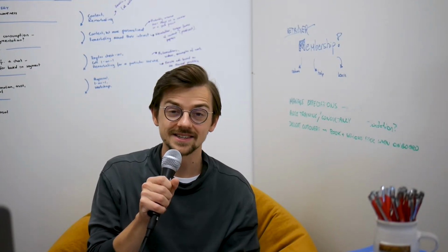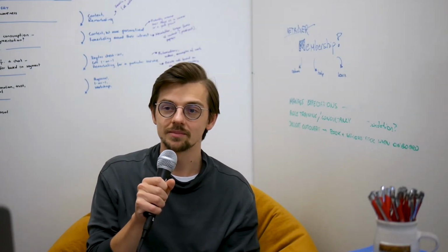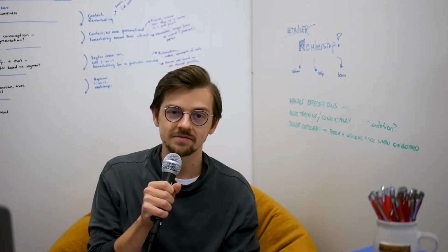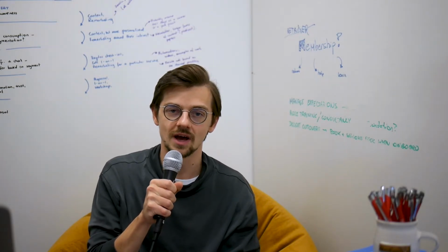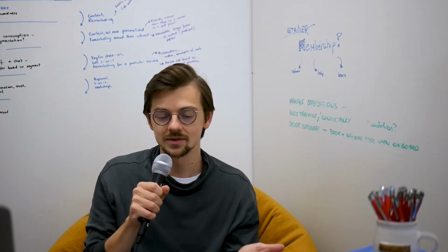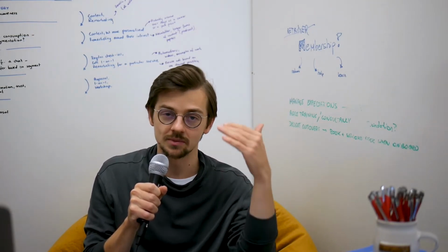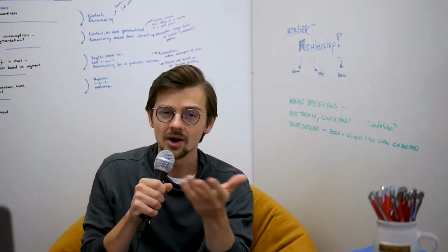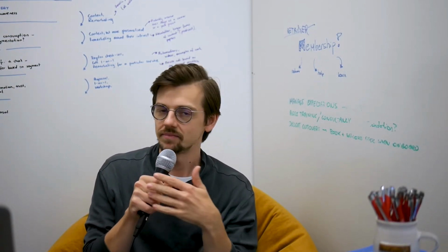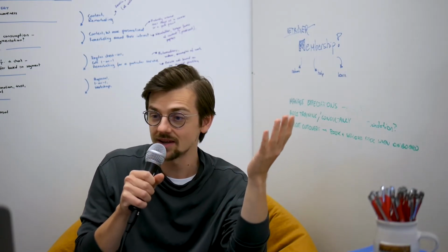Lastly, it's flexible. The entire approach is flexible. So you can wake up in the morning and be like, oh my God, that's a great idea. You come to me, you say the idea, we define the value for the end user, we write down the definition of done, what it actually looks like, and then we schedule it, we prioritize it. We know what we have in the queue, what the team is currently working on, how it fits into the picture, is it more important than A, is it more important than B, or maybe it has the lowest priority, but it's good to have it there, to not forget about it. Simple as that. It's flexible, adaptable, just like your business, and just the way it should be.